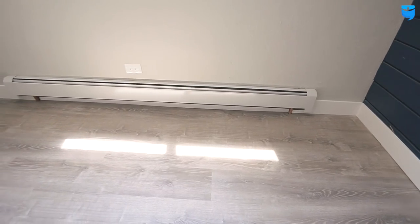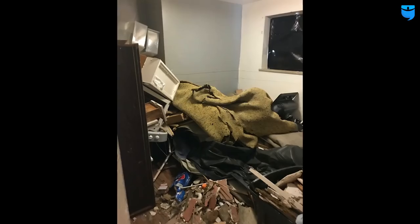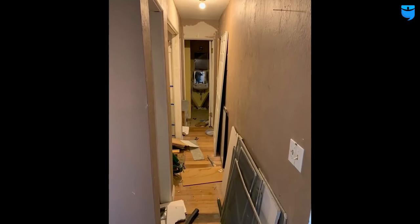That's a boiler system. When we purchased the building, it had a bunch of pinholes and it was leaking. Almost every single unit was leaking. So we had to replace the entire boiler system, run all new water lines to every single unit, and then all new registers. This place had just been really run down over the years. When we walked in here initially, there were families with 4, 5, 6 people living in here. Oh, wow. And it was really sad.